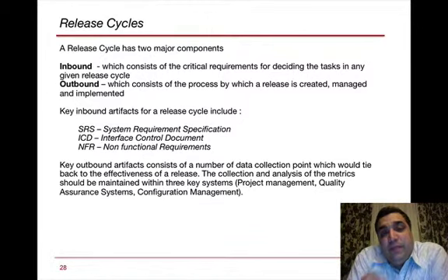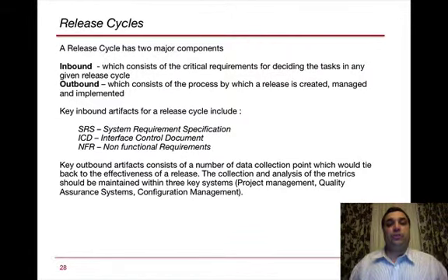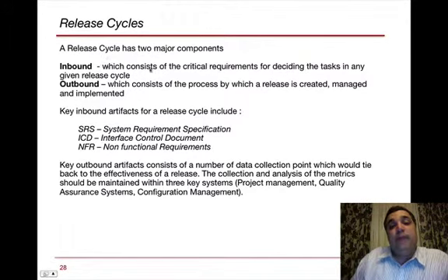By developing release cycles, you can effectively manage your resources by saying we will do a certain amount of work in a period of a month, 2 weeks, or a week. And you have two major components: the inbound, which consists of the critical requirements, and the outbound. The key inbound artifacts are the SRS, the system requirement specification, which is basically a specification document that says this is what I needed to do.